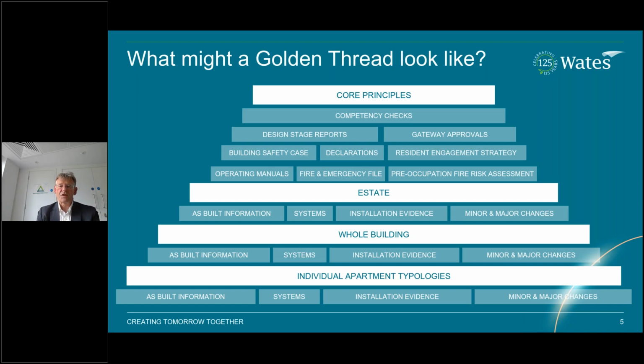And then, interestingly, the whole issue of installation evidence. I know, and I guess many people on this call know, that as we go through the process of constructing things, mistakes are made and non-compliances are raised. We, like many of our competitors, have a mechanism for tracking all of that, along with photographic records. But typically when we get a non-compliance, it's raised, the owner of that issue is asked to address it, it's fixed, and it's closed out.